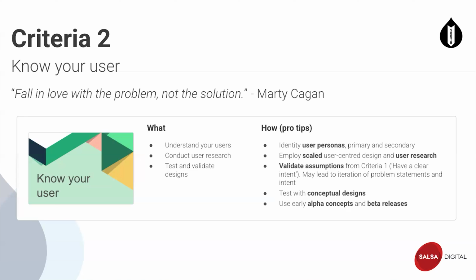Rarely would I advocate no user research. In fact, I would never advocate that. At a minimum, the project team needs to do user research, and if the project can afford, or it's justified, to have independent user research or research with actual users, I certainly would be looking at that. Ongoing, validate assumptions with conceptual designs, and ideally do user test these with a cohort of representative users.